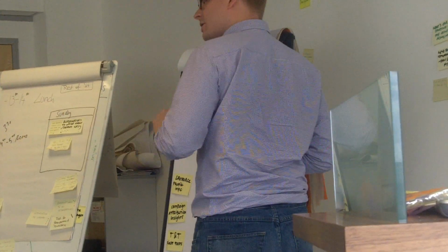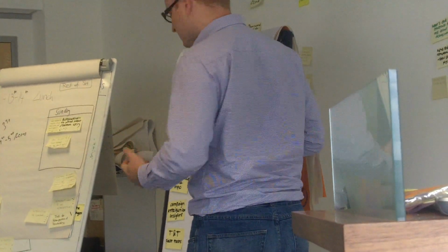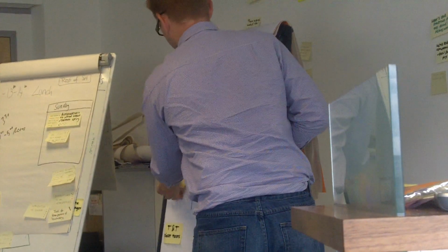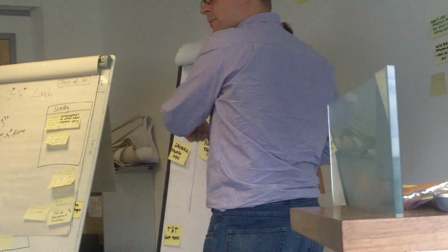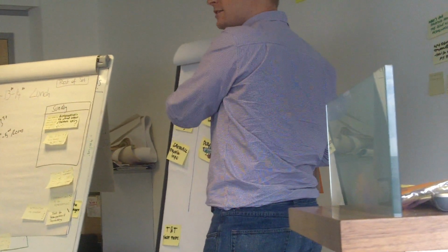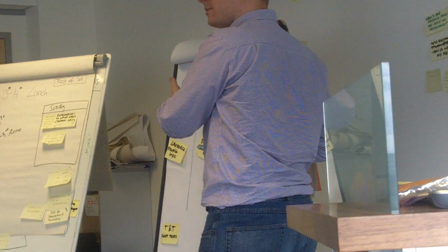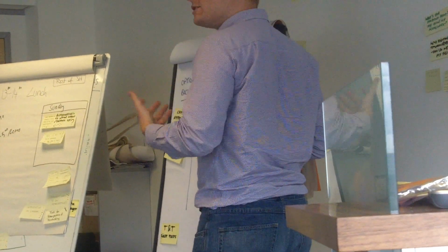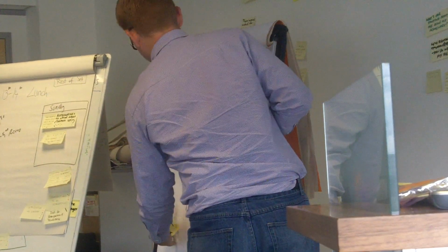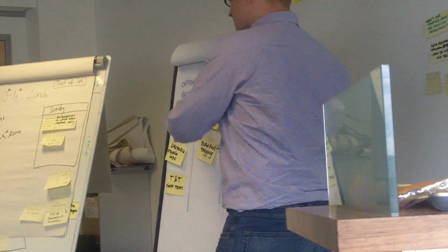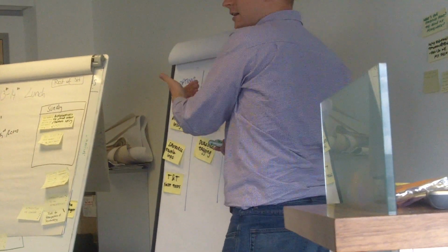The stakeholder would say, actually, based on my meeting with the management this morning, this has now become more important, so it really needs to happen. But you can't mess around with this because this is in progress. If you mess around with this, you're basically messing up the team because they were working on it, and if you get them to stop doing something and start again, that's wasteful because they're having to context switch. So they've had all the time in the world to make the decision at the point at which it was being worked on. That's the idea.